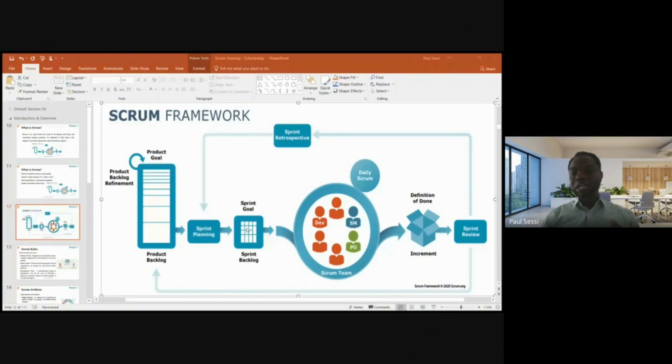So the Scrum Master is more like a facilitator. You are not telling them what to do. You are only trying to help them achieve, with this framework, what they can do. So everyone picks what they can do based on the planning, and then you as a Scrum Master assign those tasks to them. So for every daily Scrum, you are going to ask them 3 major questions every day for 15 minutes, right? So during the sprint, the dev on the sprint is what, please?